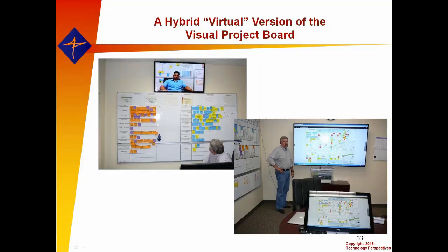Physical products are often driven by things like life testing, regulatory approval, tooling and material lead times, factory setup and equipment prove-in times. Those things are very hard to shrink. So the front end of the process, up to the point of having the detailed design and getting into a qualification testing mode, we can accelerate pretty dramatically. Once we get into that sort of long, non-effort-driven part of the project, there's not a lot we can do. There may be some tricks and some incentives, but that's kind of the hard pole in the tent.